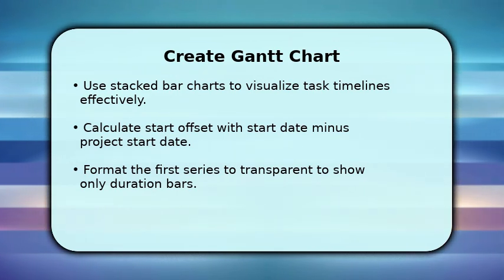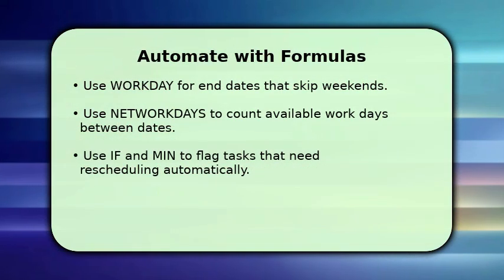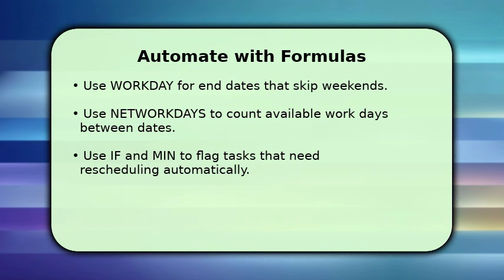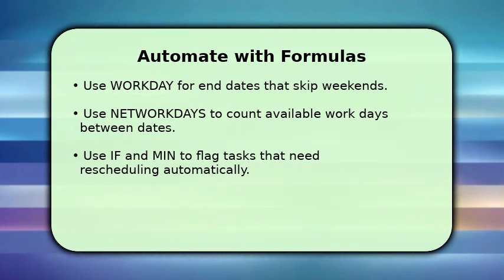Automate scheduling with formulas like Workday and Network Days to handle non-working days, and combine IF with MIN or MAX to enforce dependencies and avoid negative durations. This reduces manual adjustments and keeps the schedule consistent when tasks shift or when you update a single start date.